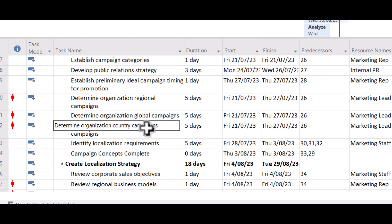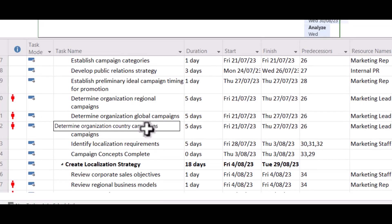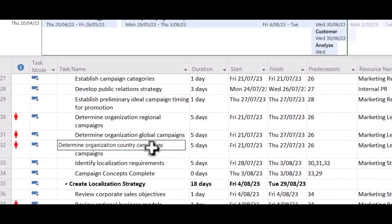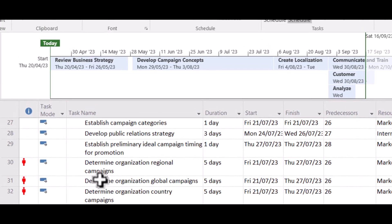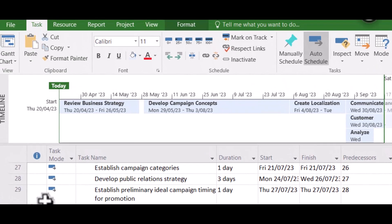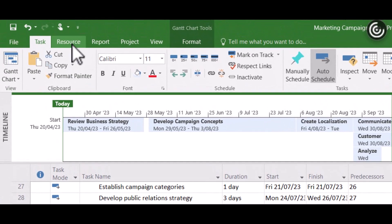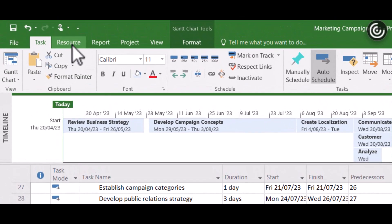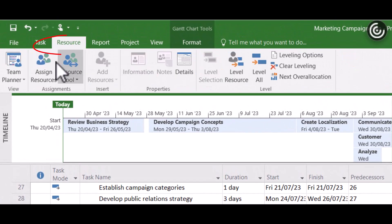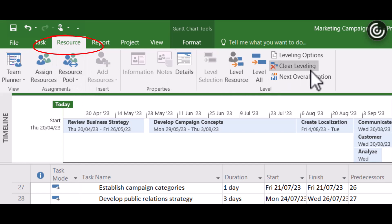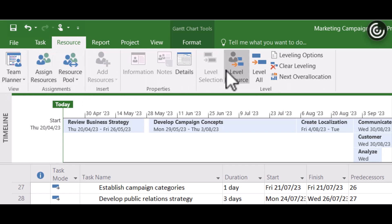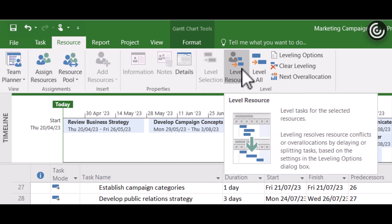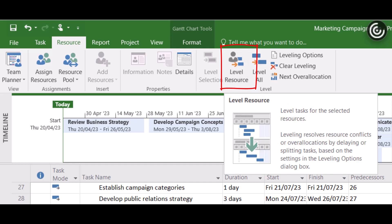So there's a simple way to fix this, and Microsoft Project can help us with it. So we want to go up to this Resource tab, and you can see all the different resource options up here, all the things you can fiddle with. But this one here, Level Resource, will automatically move the resources around to make sure it fits within their working time, meaning that you haven't over-allocated them anymore.